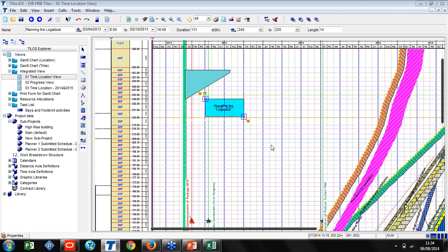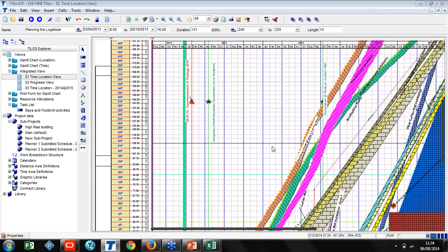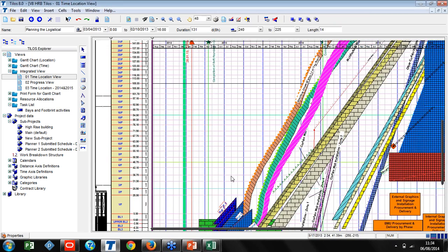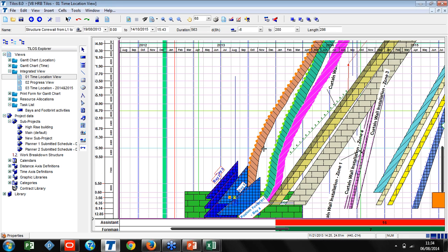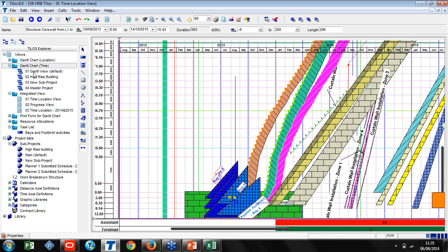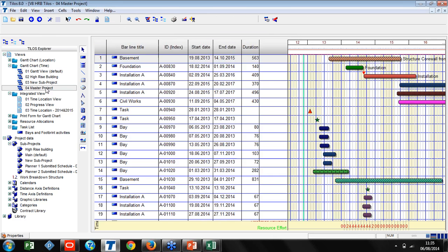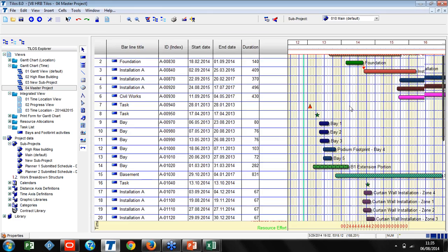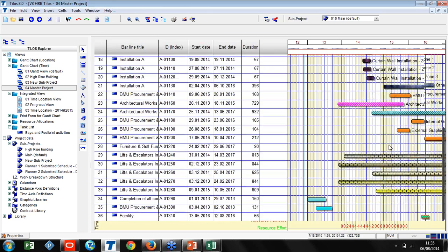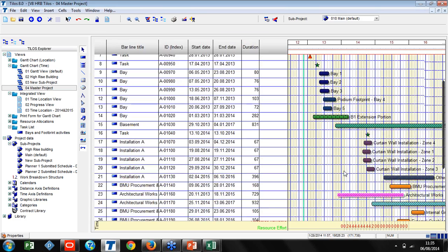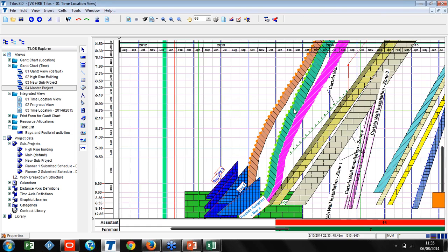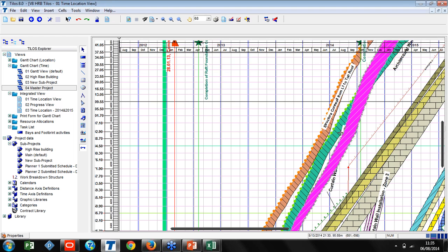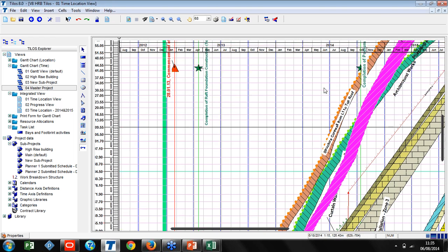Now when I look at more information for the activities for the completed part, at the beginning of the project we just completed the base, and after the base we have the other activities taking different slopes, as you see in that structure. When we look at the Gantt chart for it, we will see the master project Gantt chart. It is here, with our activities, curtain walls, architectural works. But the Gantt chart is not exactly giving us that information, and it is more for submitting your schedules. But when we look here, we will see exactly at which floor we will be and when.